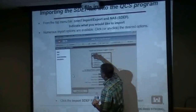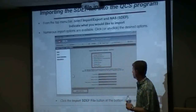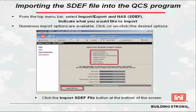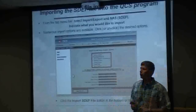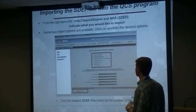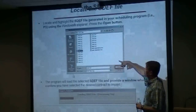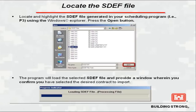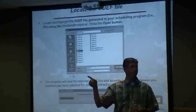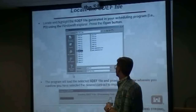Importing schedules — we're going back to the import-export screen with the NAS SDEF, putting check marks in the lock. You have to have all of these features before it's going to import the schedule. You're going to select Import SDEF and find the .txt file. You can name it whatever you want — when you do SDEF out it's called SDEF.txt — and then import that file.